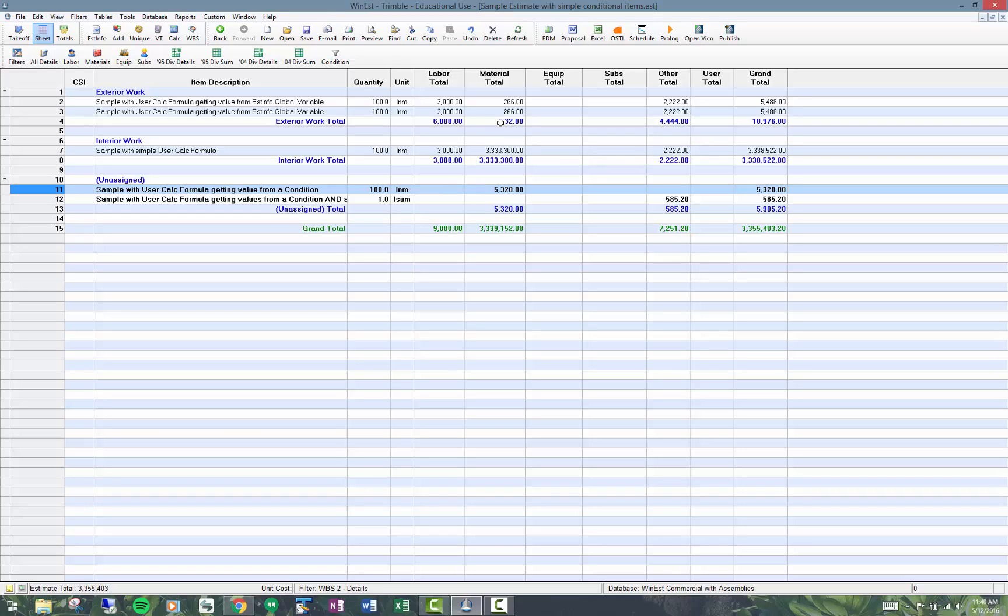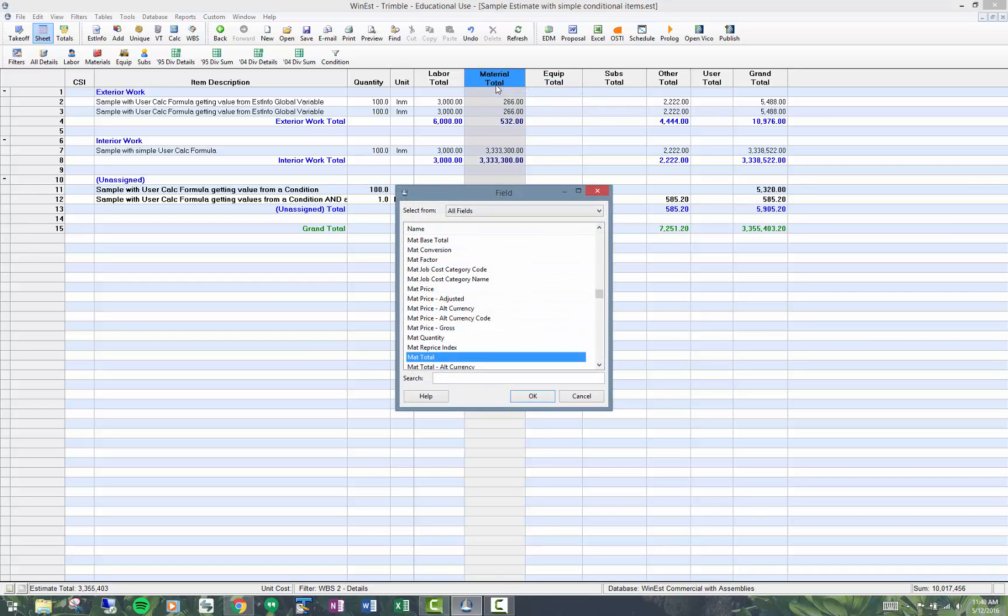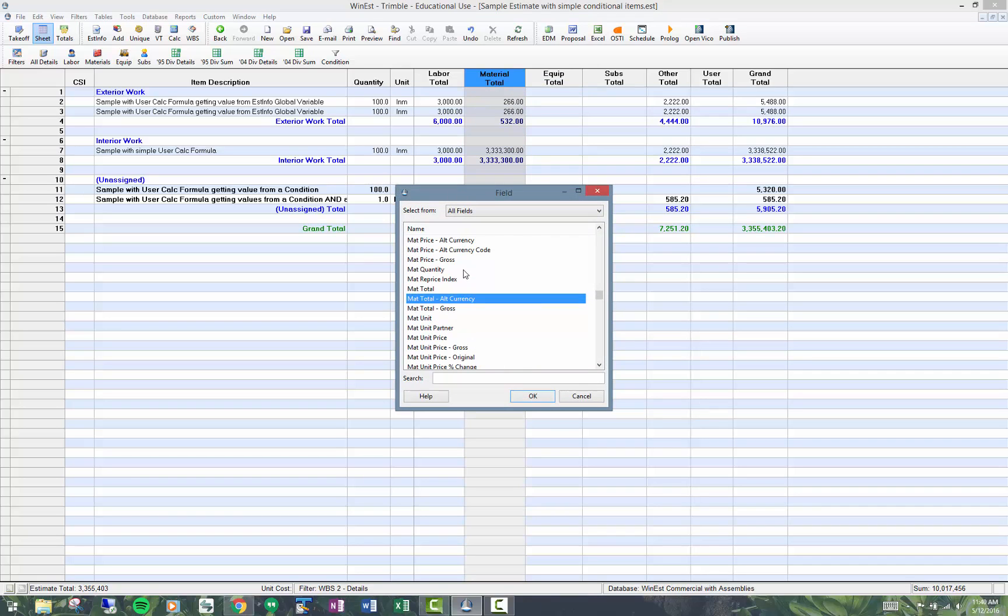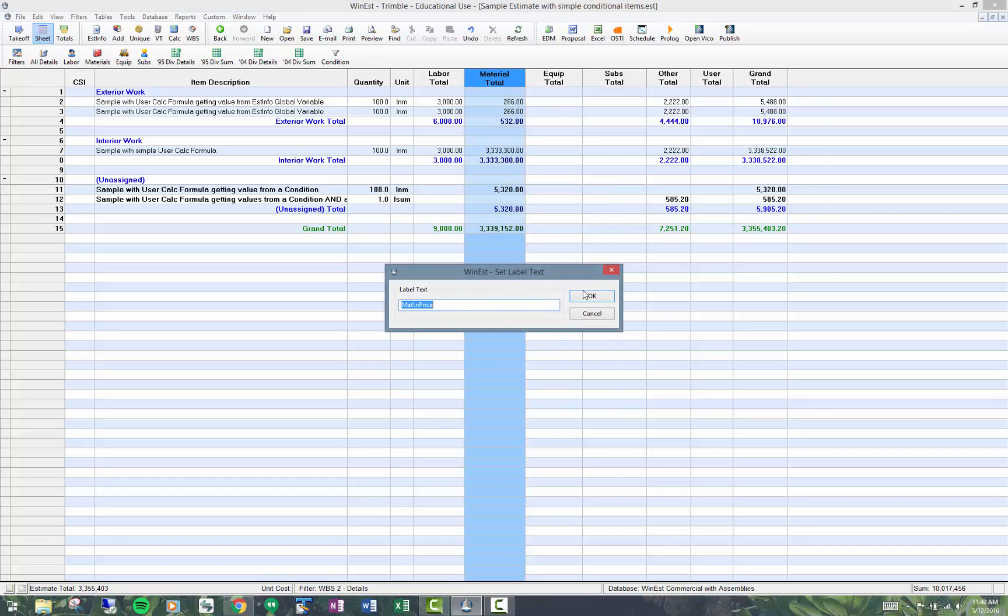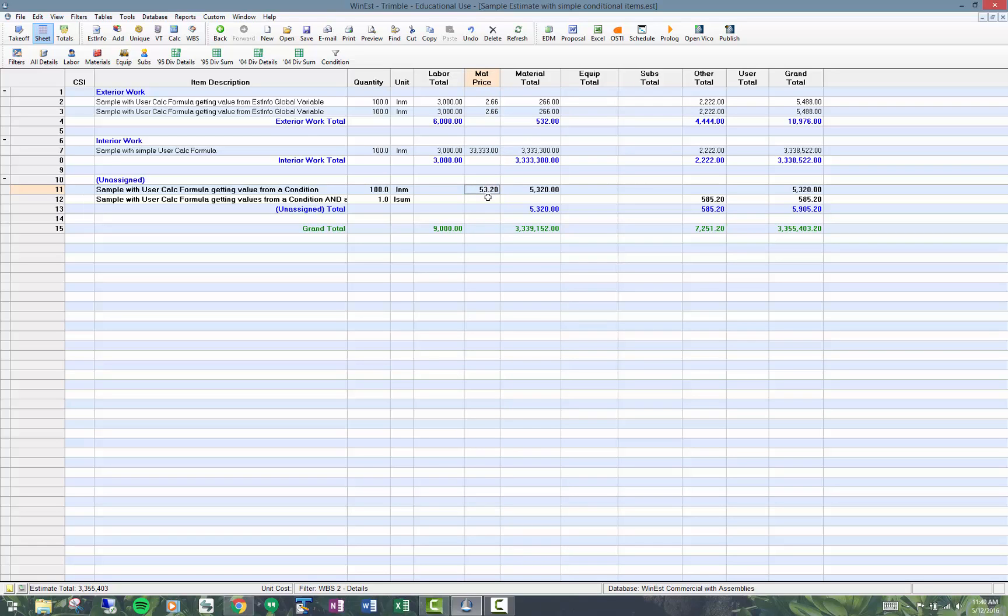What you're seeing here is a material total of $532. I'm actually setting the material price or the material unit price. Let me put that column in here. I'm getting 10% of that material total. If you recall, we're multiplying it by 0.1 and my quantity is 100, giving me a total of $532.